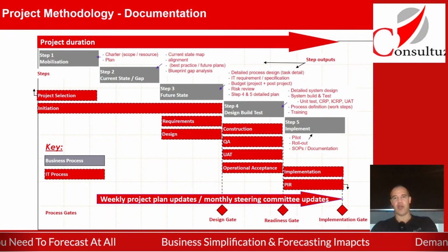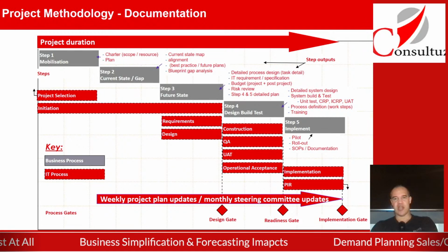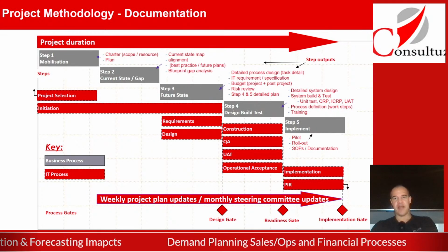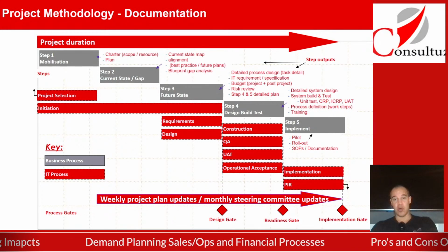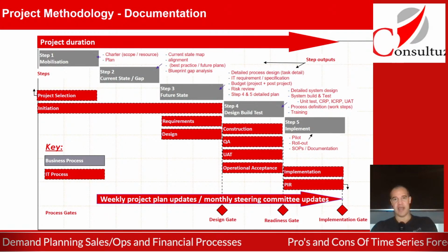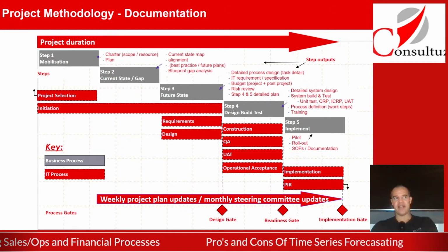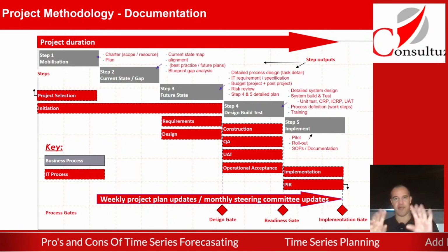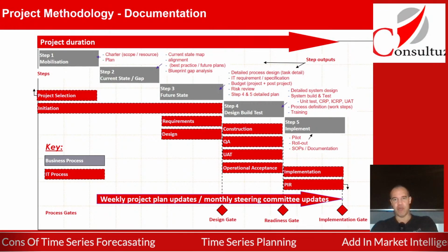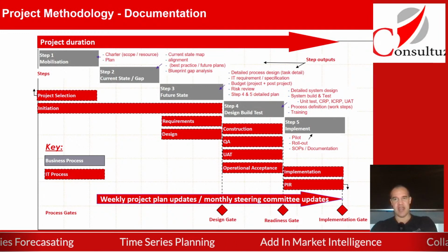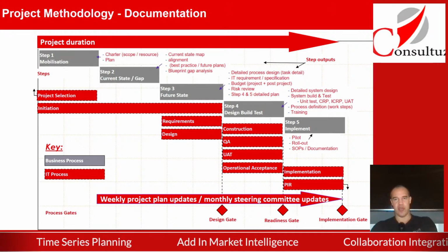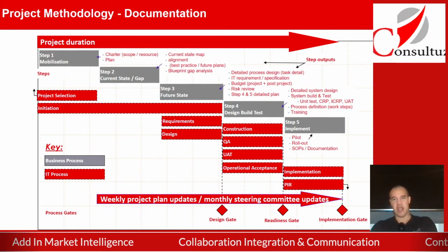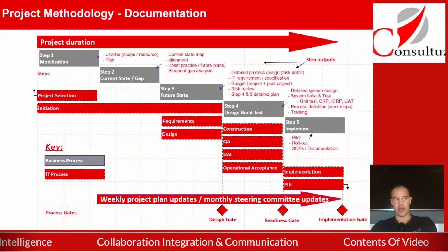Once this has been done, the project moves on to the next stage, which is user acceptance testing, and this can be done on an individual module basis initially, and it can be done on an integrated testing basis, which basically means 1 or 2 processes joined together running a test to see if the desired outcome, the outcome that you wish to move to, is actually being achieved through testing the system and the way people work.